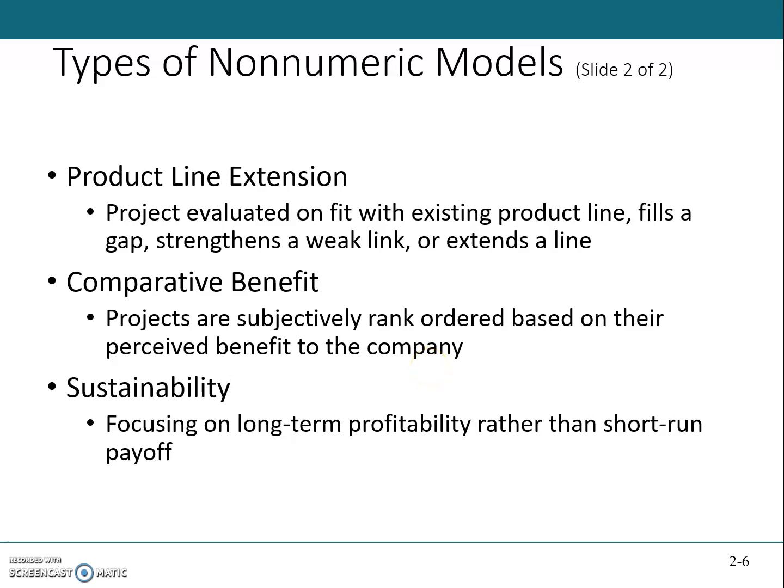And when all categories have 8 or fewer members, the projects within each category are ordered from best to worst. So again, the order is determined on the basis of relative merit. The rater may use specific criteria to rank each project or may simply use a general overall judgment.